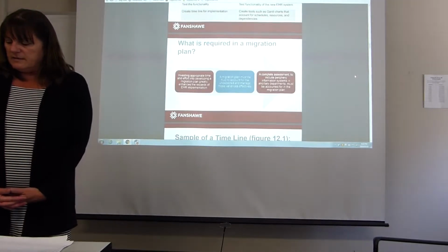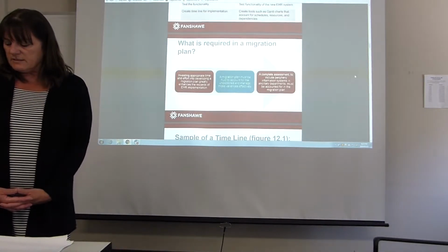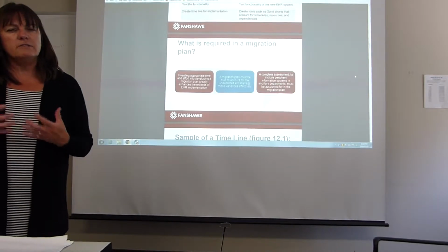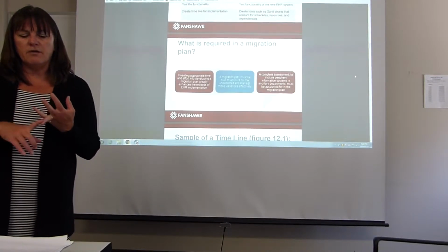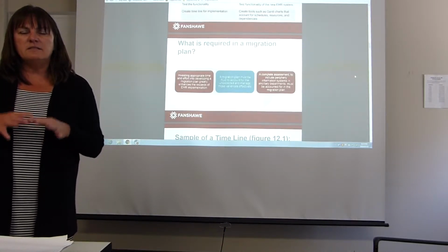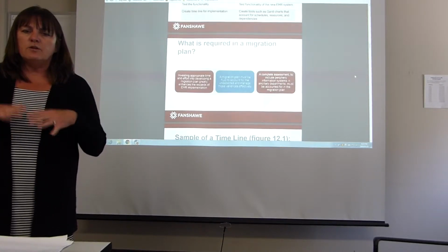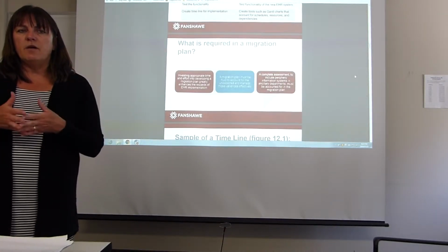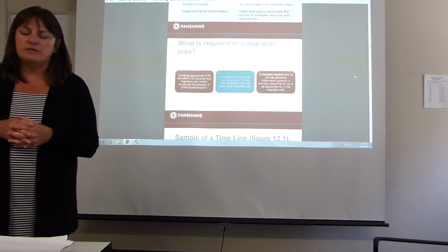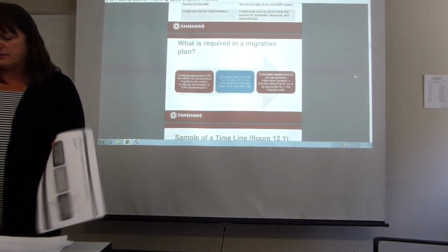The next step is a complete assessment to include periphery information systems. So if our PowerChart system, when we were implementing it, we needed to also think about our pharmacy system, our nutrition system, our radiology system, our lab system, and make decisions about integrating those systems and interfacing those systems. So what does this affect? And do we want to have sub-projects underneath it, so we have the integration of all the systems together? So that also needs to be considered.